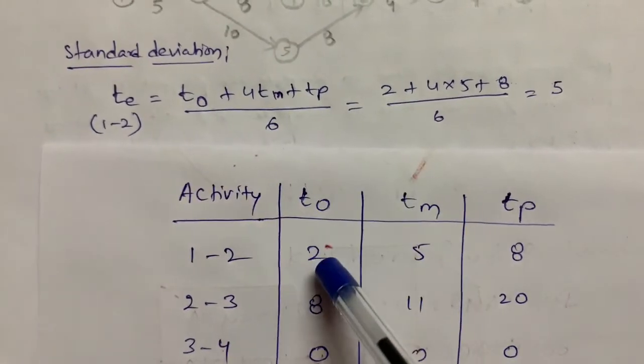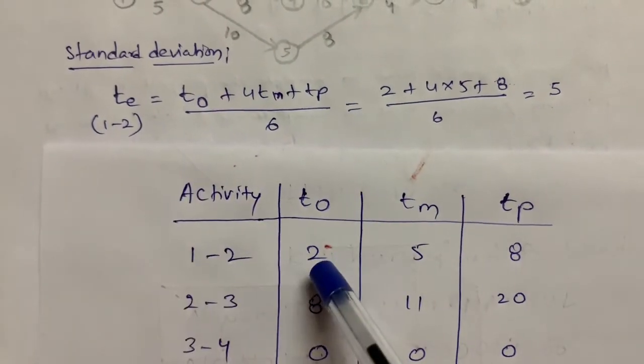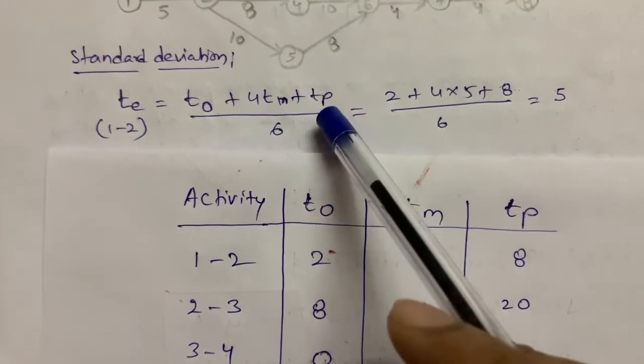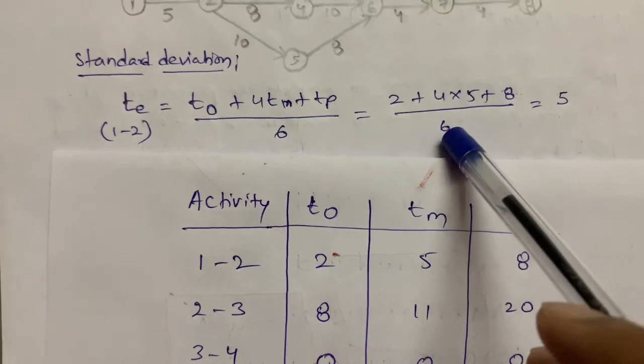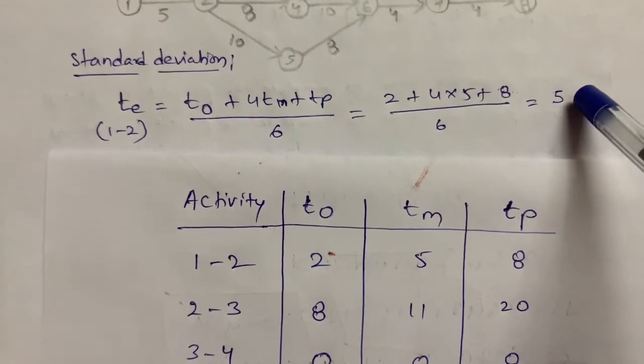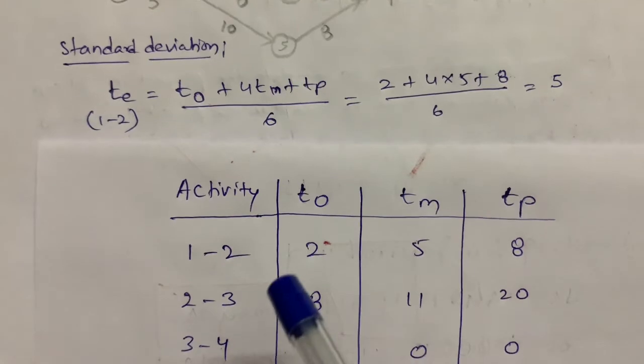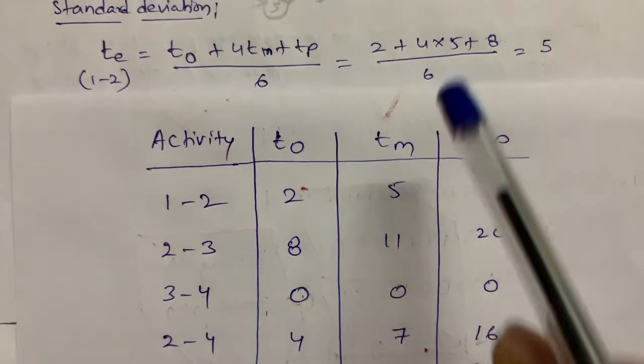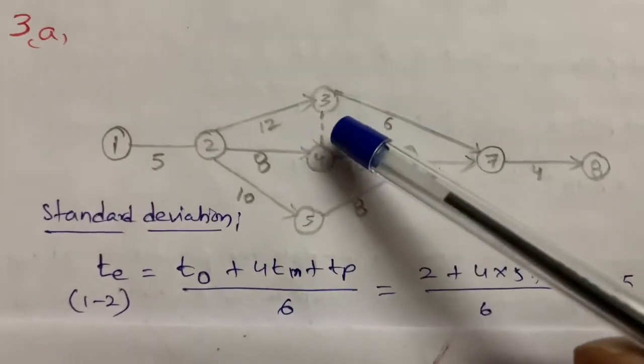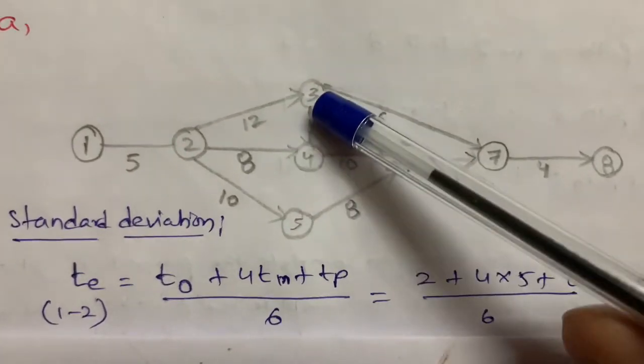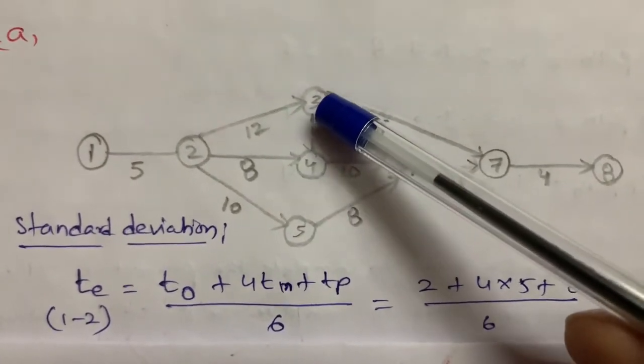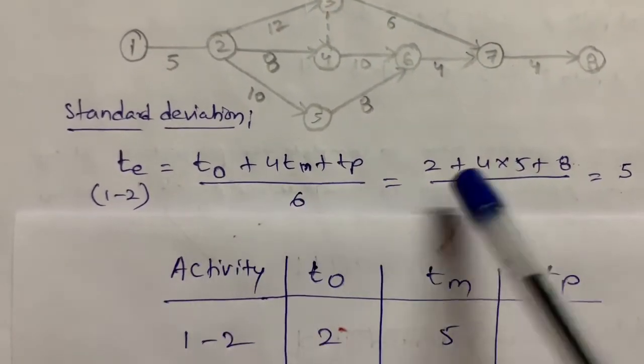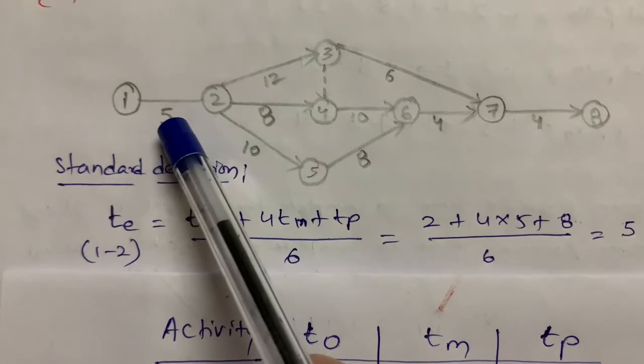TO value, we know that for 1 to 2 activity, that is 2. TM value is 5, 4 into 5 plus TP value is 8 by 6. I got 5. If it is days, we represent it as days. But here, 3 to 4, he given that 0. 0 is nothing but a dummy activity. There is no duration. We just represent it in dotted lines. Like that, I calculated for all the activities and I wrote the days here.